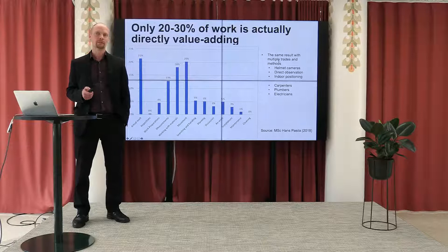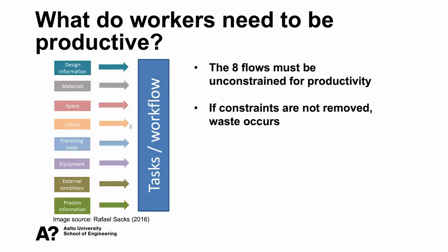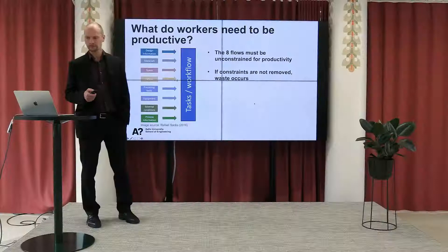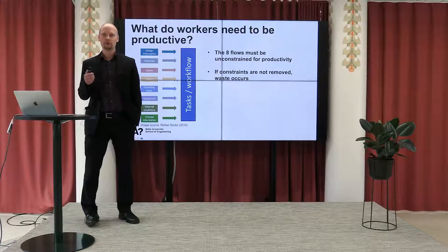In order for workers to be productive, they need a lot of different things available at the right time in the right location. They need feasible designs that can be constructed, all the materials needed to implement the task, obstacle-free space, workers need to know where to go, preceding tasks must be completed, they must have the right equipment, and humidity, temperature, and other external conditions must be just right. All eight of these things must happen for productivity to occur — if any one is missing, you lose value-added time looking for materials or space. The key to improving productivity is to focus on decreasing this wasted effort caused by missing one of these constraints.